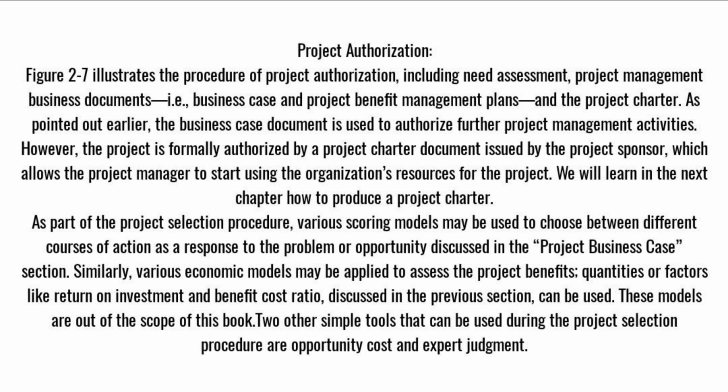As pointed out earlier, the business case document is used to authorize further project management activities. However, the project is formally authorized by a project charter document issued by the project sponsor, which allows the project manager to start using the organization's resources for the project. We will learn in the next chapter how to produce a project charter.